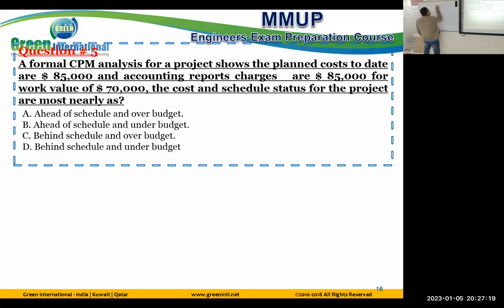Now SPI is equal to 70 divided by 85. Sure, 100% less than 1, almost around 0.8. Assume you are now progressing 80% of your plan. You are behind schedule 20%. See, a lot of meaning. You are behind, you are achieving 80%. See, all the status.